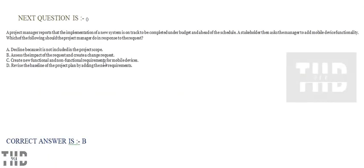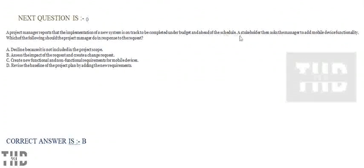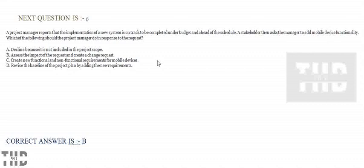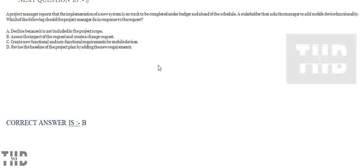The project manager reports that the implementation of a new system is on track to be completed under budget and ahead of schedule. The stakeholder then asks the manager to add mobile device functionality. Which of the following should the project manager do in response to the request? Option A: Decline because it is not included in the project scope. Option B: Assess the impact of the request and create a new request. Option C: Create new functional and non-functional requirements for mobile devices. Option D: Revise the baseline of the project plan by adding new requirements. Option B is correct.